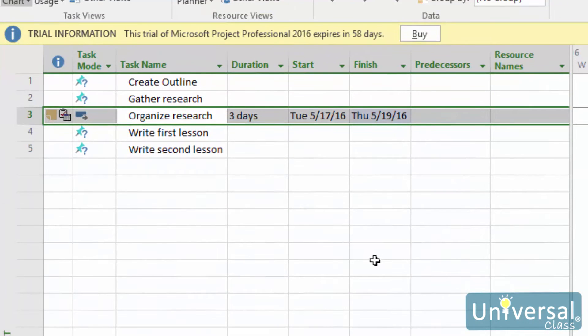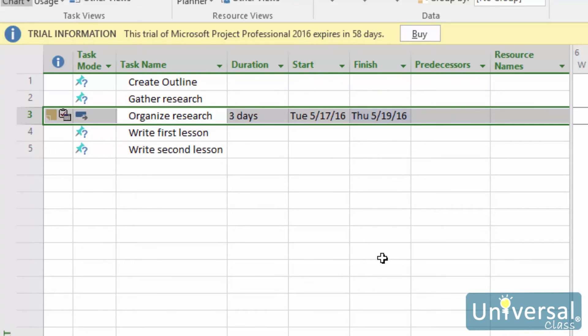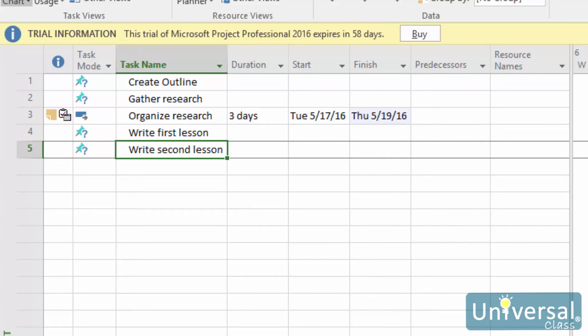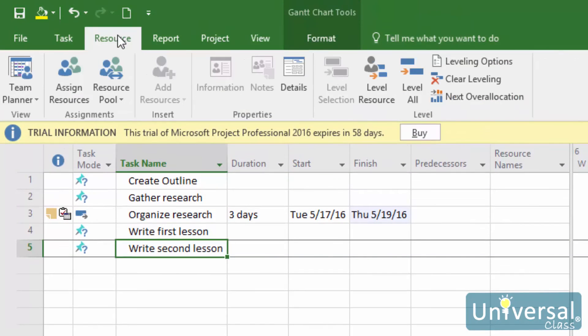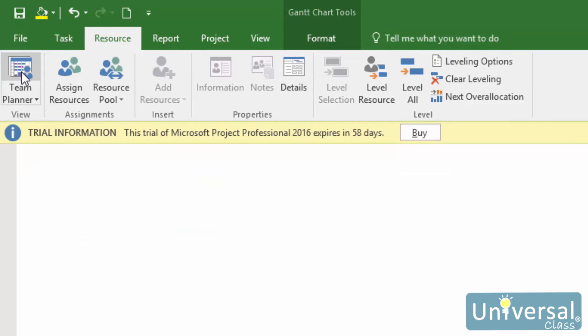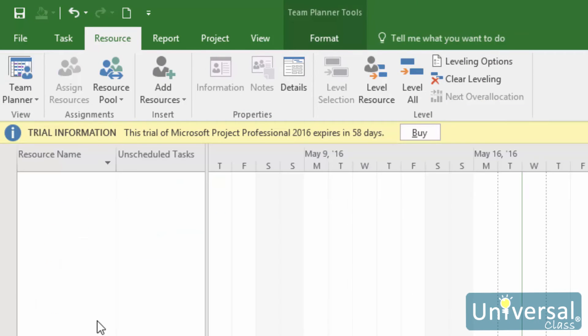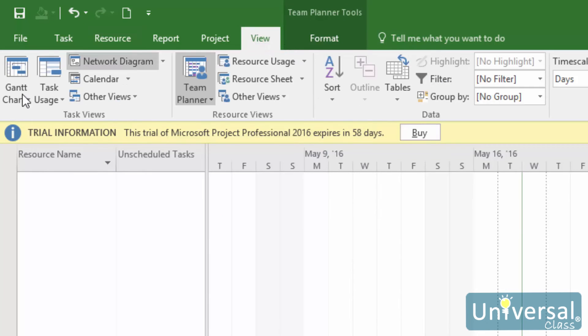If you have a resource assigned to a task that has a modified calendar, the resource will only work during hours that the two calendars, the resource and the task, have in common. You can only have one calendar for work resources. You cannot have a calendar for material resources because material resources are charged by units used. To modify a calendar for work resources, display a view that shows the resource column.